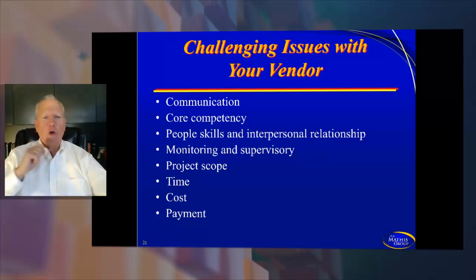The project scope, we always have to have trouble sometimes on the project scope, what the customer wants and demands, what we understand in the contract, and blending that together. The time, the cost is all parts of that as well. And then payment. How is payment delivered? Is it based on deliverables? Is it based on time? Is it based on milestones or the completion of phases? All of these are pieces that have to be talked about, because all of these can make a huge difference in the success of the vendor and the cash flow of the vendor, and also the happiness of the customer that the vendor is delivering everything they say they will.